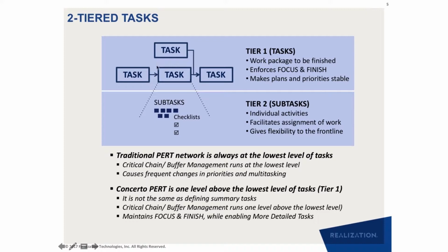And it is not that a task should be between 1 and 2 weeks long. We have done construction projects, for example, large infrastructure construction projects, where tasks are about 4 to 6 months long. So in a critical chain plan, you can have tasks that are 4 to 6 months long, and a lot of the details of day-to-day execution are thrown into the subtasks. So hopefully, with the examples that I will share with you, it will help you get some rules, some ideas about what should be a task and what should be a subtask.